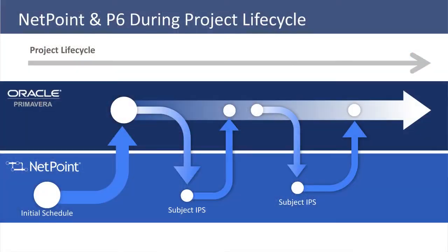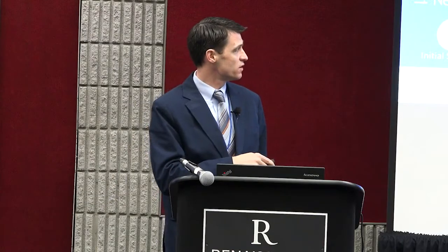What's the next step? So we'll hold these subject IPS sessions talking about, all right, let's detail out the Building 2 design, or the early packages for Building 2, or a suite build-out, or whatever it is. Sometimes those IPS sessions would turn into a detailed work plan, and they would never make it into P6 because we don't need that level of detail there, right?